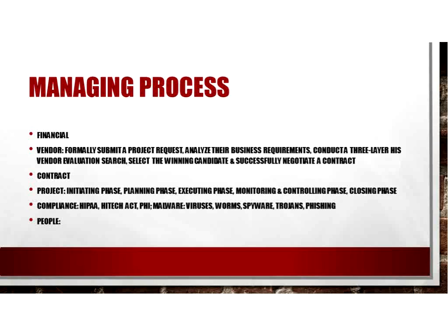Another area in which unexpected costs may arise in HIS and EHR implementation is related to project duration. If your project is taking longer than expected, then more cost is usually associated with that increased duration. So we have to pay attention to that. In addition, the cost to maintain operations are high due to things like training requirements, and productivity dips when you implement a new technology.